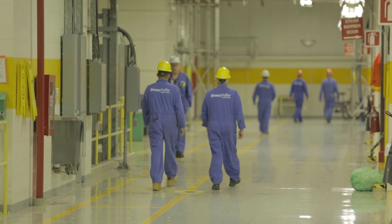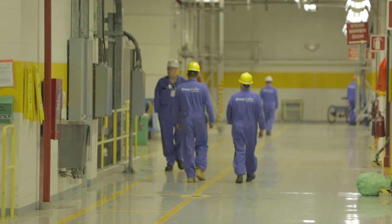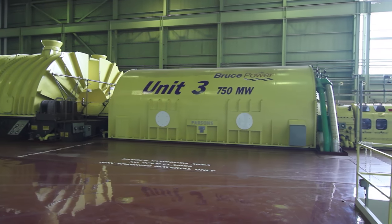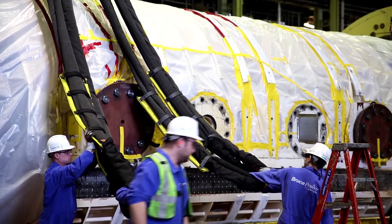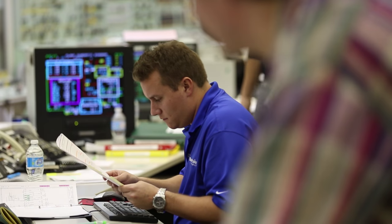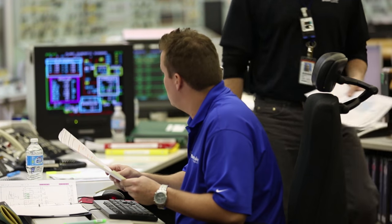Our site deployment team provides military-level planning for mega projects. This includes preparing all of the logistics needed to efficiently deliver the people and equipment needed to build a mega project. In the nuclear world, the team is working on techniques for staging of personnel and equipment in secure facilities, doing the security clearances and all of the equipment checks and inspections prior to entering the protected area of the nuclear facility. This is really going to improve the efficiency of on-site activities.